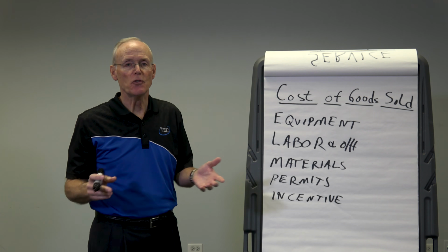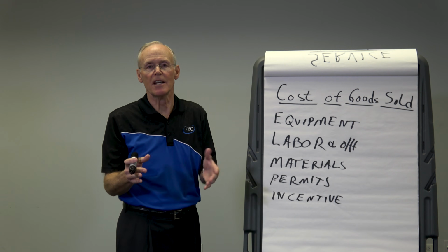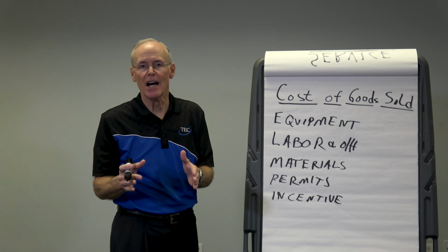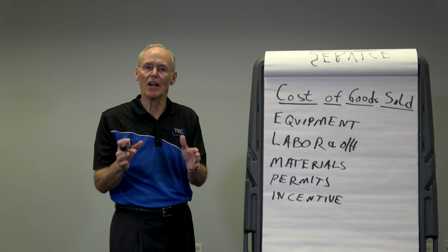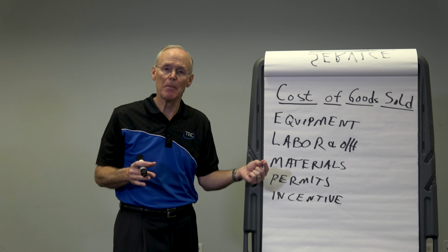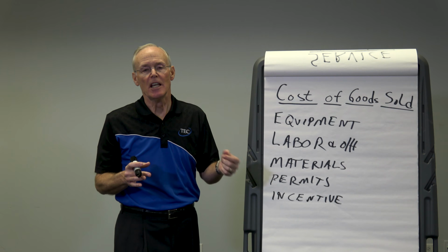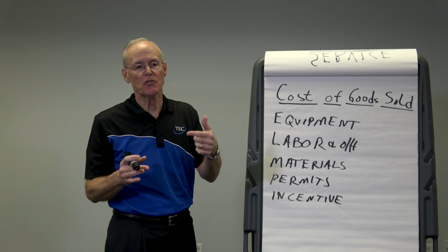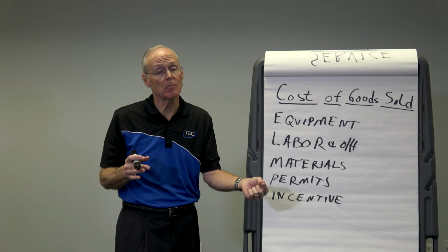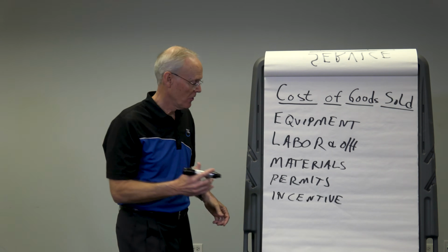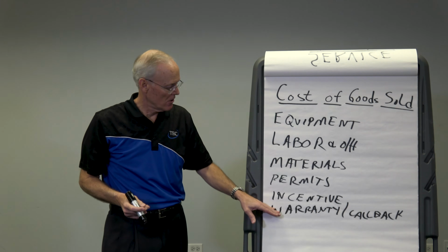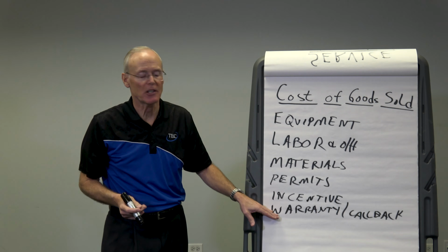Sure. If you didn't sell the job for warranty, let's be specific here, warranty expenses are if the part breaks down. You as the installer have to cover the first year. You have to have a little bit under your cost of goods sold to maybe send the guy back 1 out of 10 jobs. If it's a callback, that's when the service tech did something wrong, and you got to send the service tech back and you got to pay him to correct the problem. So yes, warranty and callbacks. They're here because you got the job and only because you got the job.